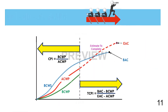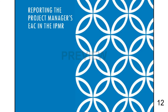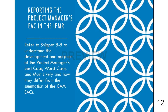This graph demonstrates the relationship and difference between the CPI and TCPI. The CPI is a measure of cost efficiency to date on the project, while the TCPI is a forward-looking index that measures the efficiency required to achieve the EAC. The Integrated Project Management Report, or IPMR, requires reporting of the project manager's best case, worst case, and most likely EACs, which will differ from the summation of the CAM EACs. The process and reasonings for the difference are explained in Snippet 5-5, IPMR Purpose and Use.